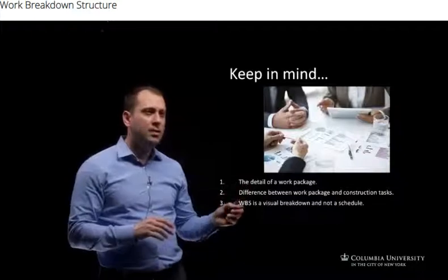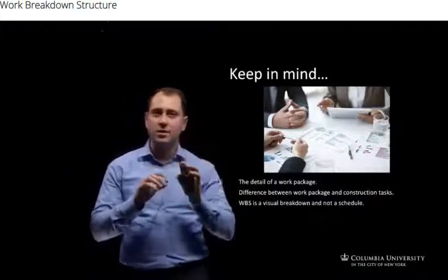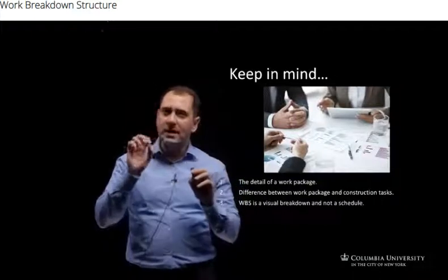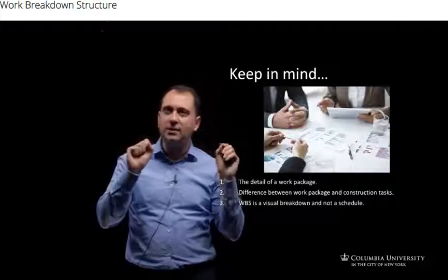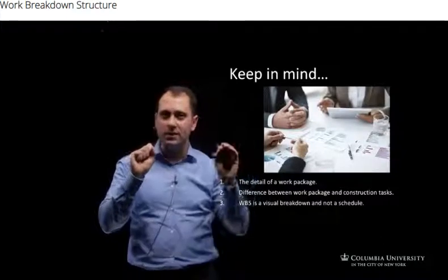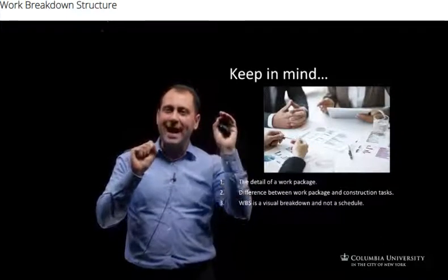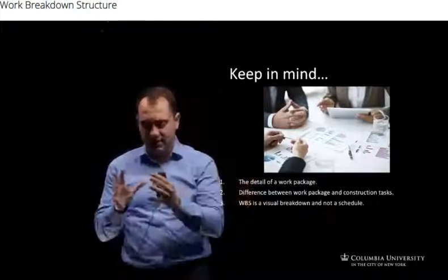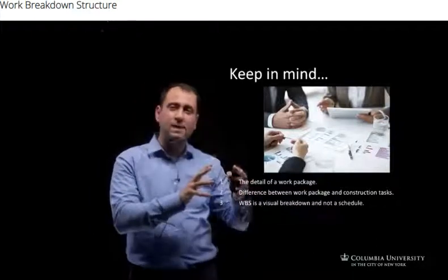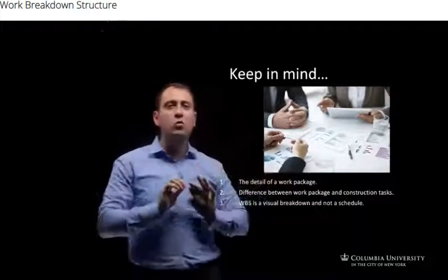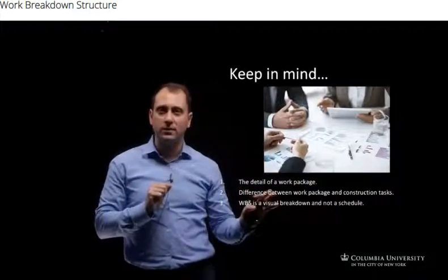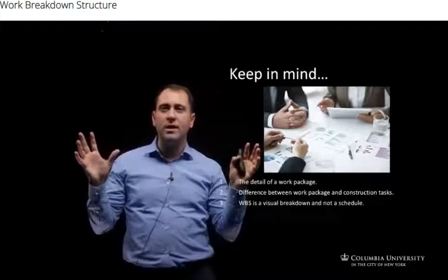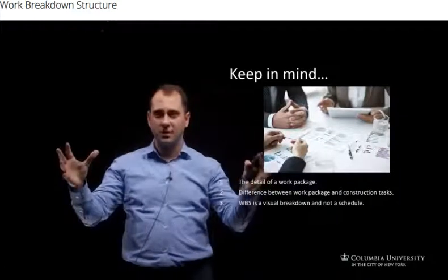Three is the WBS is a visual breakdown and not a schedule. You have to make sure to distinguish between both. A WBS cannot be replaced with a schedule. It is not required to be created in any type of order or sequence like a schedule, where you have to finish this, then start with this, and then the others. That we will cover in later modules. The WBS is simply a visual breakdown of all the deliverables you have in the project.